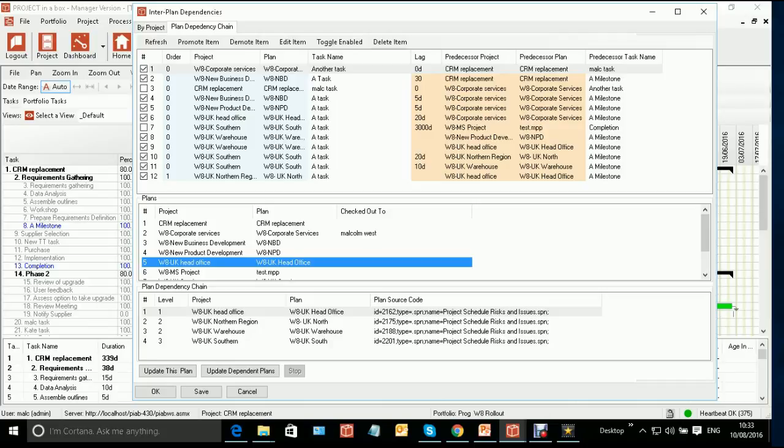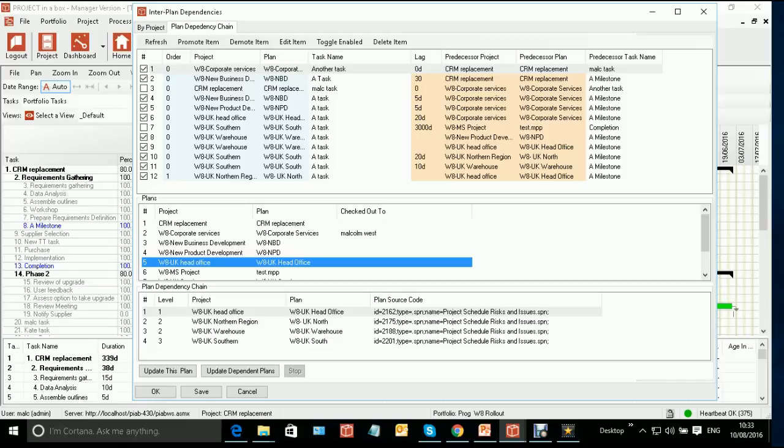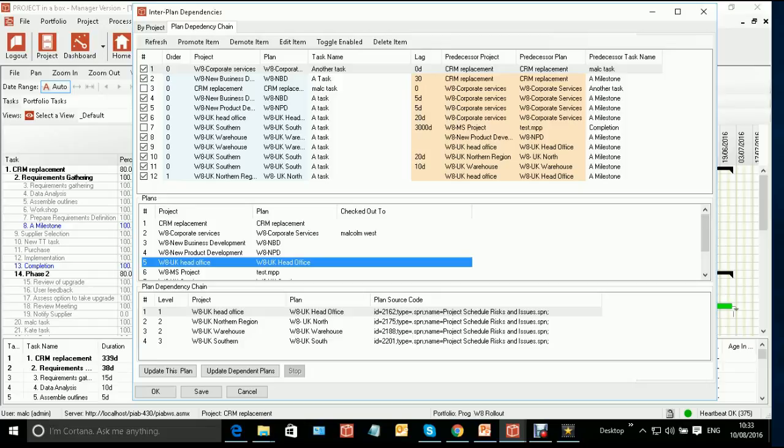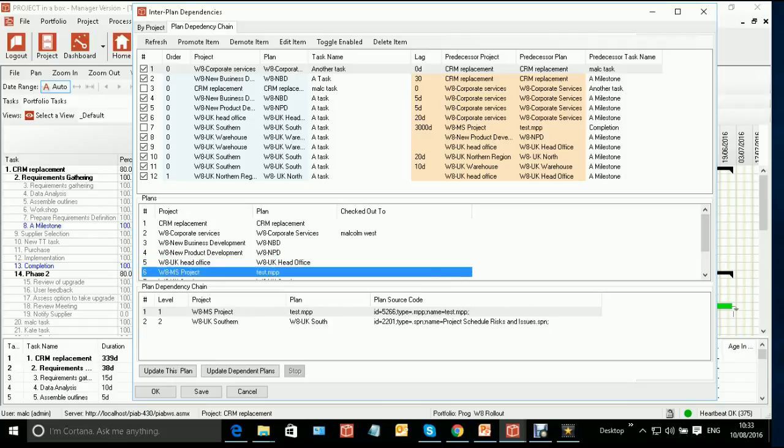Now, it's doing that using some algorithms. It may not always be right, because sometimes it's going to look for earliest start dates, for example, and hope and suspect that other plans with a later start date should follow after that one. If you're making a gross change by moving a project a long way, you may find that that falls out of sync a little bit. And you can, therefore, move the projects up and down in the order here, demote or promote them, to help set that up in a better way.